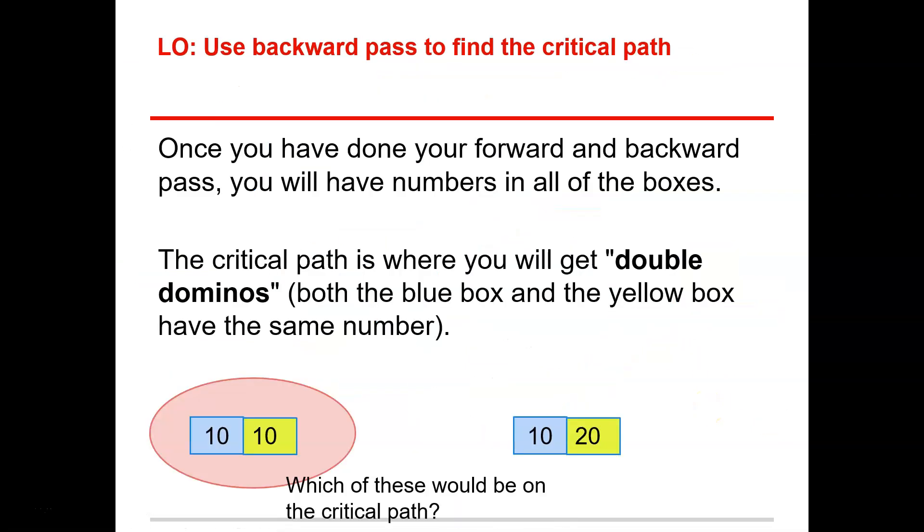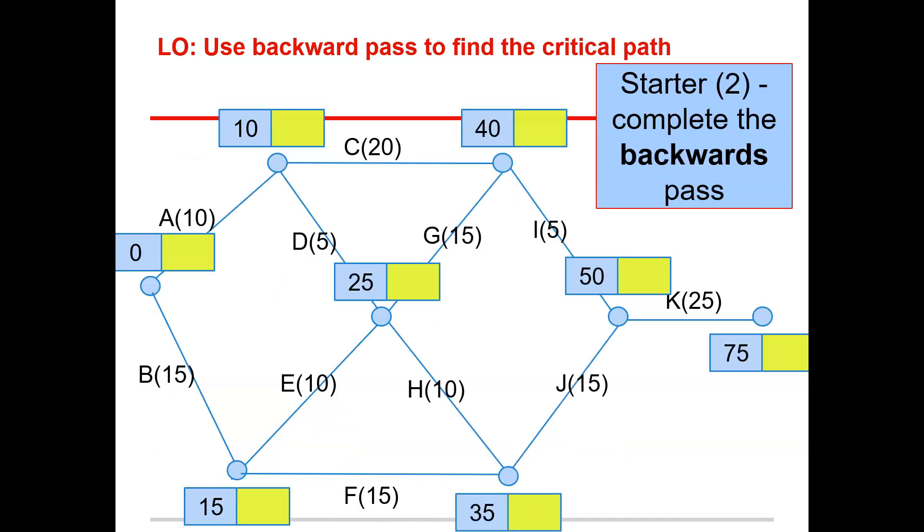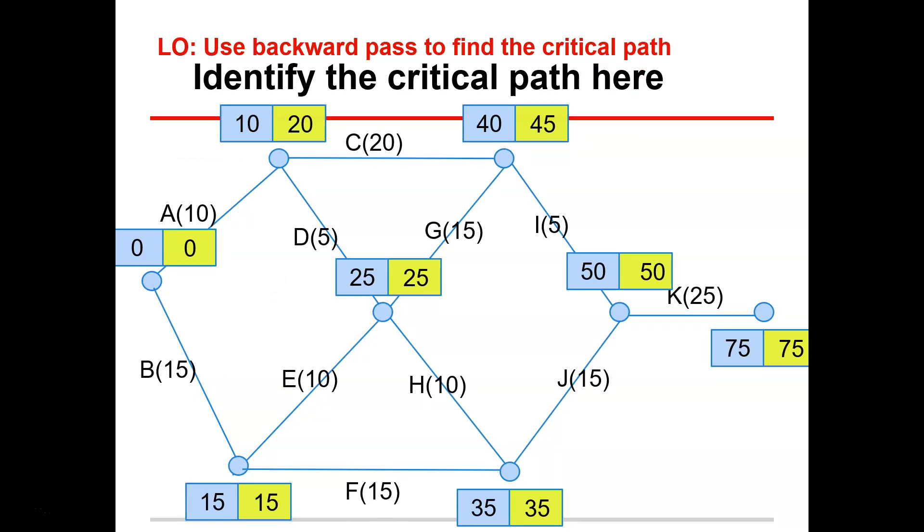So there's a few more examples in there, but I'm going to skip through those and have a look at what I just explained to you by finding the critical path. So once you've done your forward and backwards path, you have numbers in your boxes. So the critical path is where you get the double dominoes. That's a good way to put it. So where both the numbers are the same. So like we did before, we could find them. So for this one, for example, it would be K here, then I,